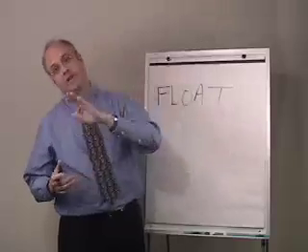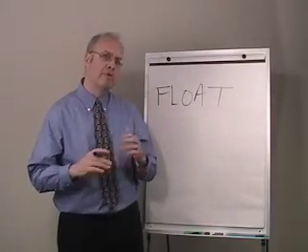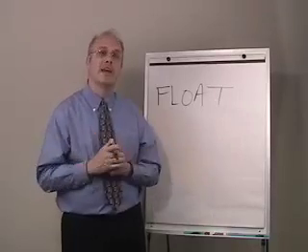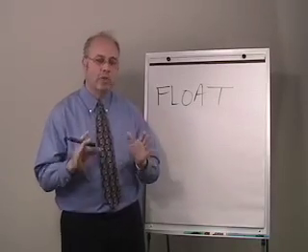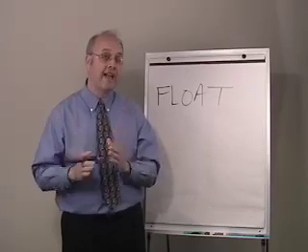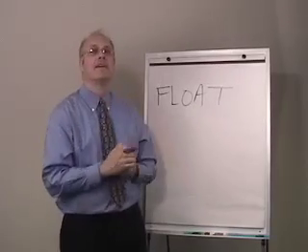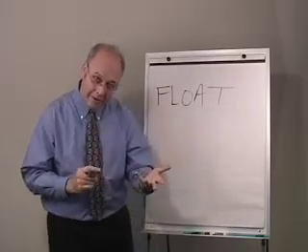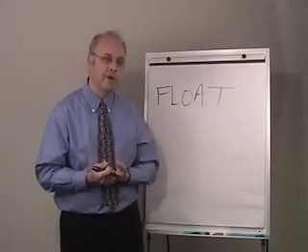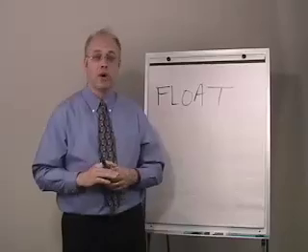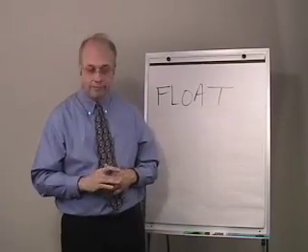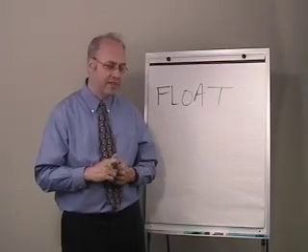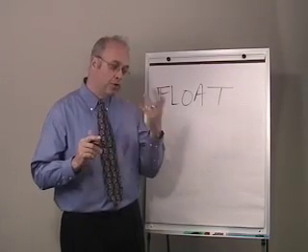Another kind of provision, on the opposite side of things, would be a provision where the owner says they own the float, and there certainly are provisions out there like that. Essentially what those provisions say are the same sorts of things that those provisions would say to a subcontractor, which is that the general contractor, in this case, when the owner owns the float, has to start and finish their work all by the early dates. There is no float. They all have to start and finish on their earliest dates. So those provisions are out there.